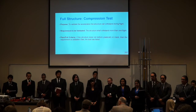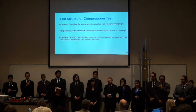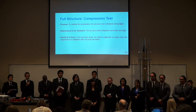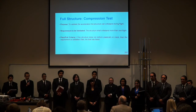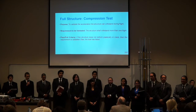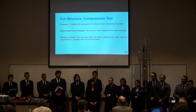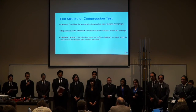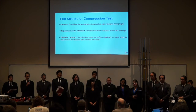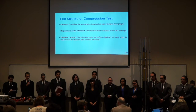I had a lot of questions about your test results, which you summarized at the end. I guess what I'd like to say about that is you probably learned way more on this project by having all of those problems than if it had gone perfectly smoothly all the way through. When industry does something like this, they don't have the same kind of time constraint that you have, where you are done at the end of the semester and can't extend the project. Just as you talked about, they will add margins to their schedule to accommodate problems during testing or build or manufacture. So that's clearly one of the things I think you learned out of this.